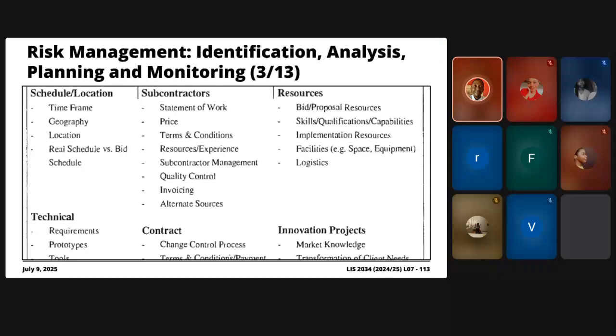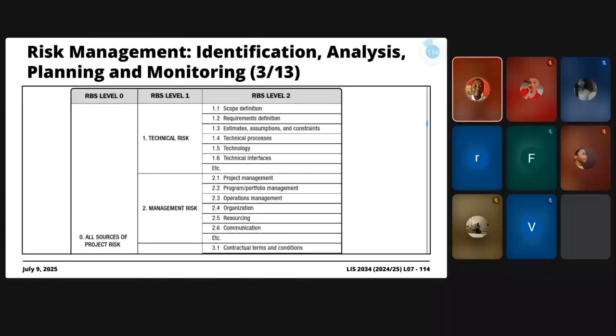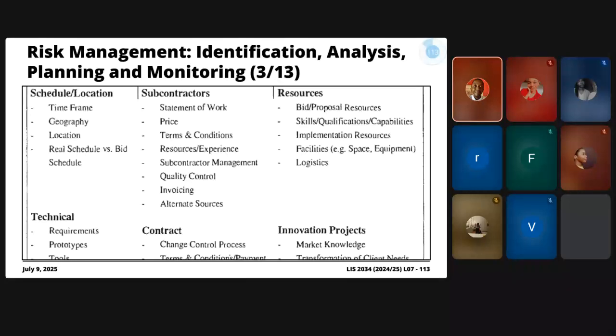And there are people who have come up with interesting ways of categorizing these risks, if you will, right? So a slide is just showcasing a paper by, I've forgotten the author, showcasing how risks as they relate to software in this particular case can be categorized. Okay, so there are risks associated with time, pricing information, and risks associated with the resources, the skill set required to execute the project, for instance.